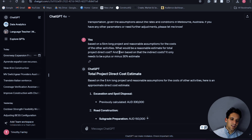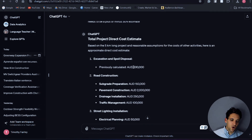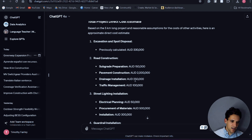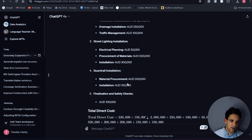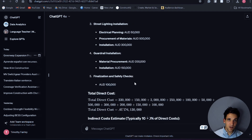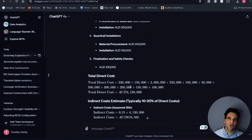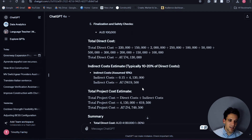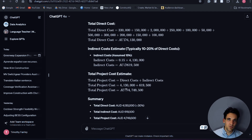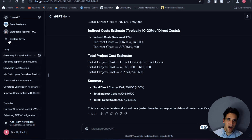I've asked ChatGPT to make an overall estimate of total project direct costs and then put a markup on this to calculate indirect costs. It's got the road construction activities, the street lighting installation, the guardrail installation, and it's applied these direct costs to all of these different activities to help us determine total project costs, then apply profit and markup, and work out our indirect costs for the project based on these direct costs.